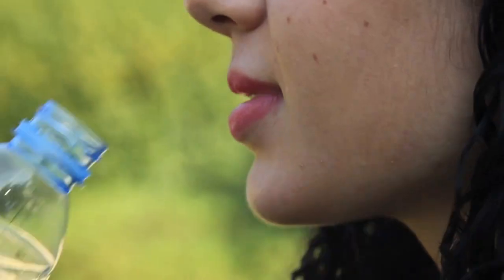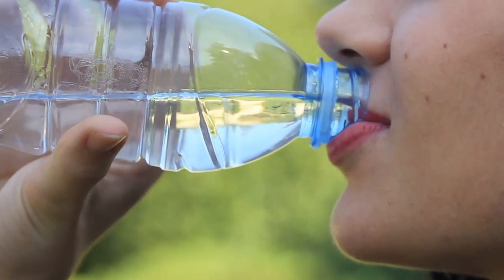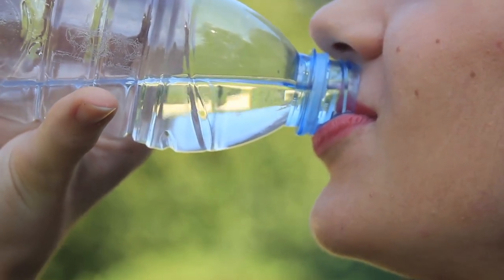I'm taking that into consideration because that is going to be more work. Are there signs of moisture is another one. What about efflorescence? Is there efflorescence on the floor or the walls? Is there moisture within the vapor barrier? One of the things that's hard for me to quantify in talking to somebody who doesn't do this is typically you can walk downstairs and I can taste how wet it is, right?